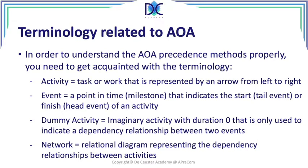First of all, what is an activity? An activity is a task or work that is represented by an arrow from left to right. We always draw the diagram from left to right. The length of the arrow is not relevant to or related to the duration of the activity. It just indicates this is an activity from point A to point B, with a duration of so many days or weeks.